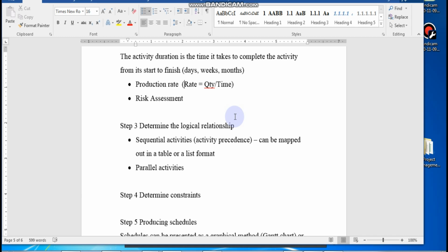And then also, before you draw, you think about potential constraints. Like for example, these are all external constraints if possible. Okay, when we talk about internal constraints, they are already appearing here in the duration calculation. So external constraints is where you think, some activities must finish within this month. There's the opening of another project next month, so I must finish certain activities here so that I can shift some of my resources to the other project. So those are external constraints that you can think of.